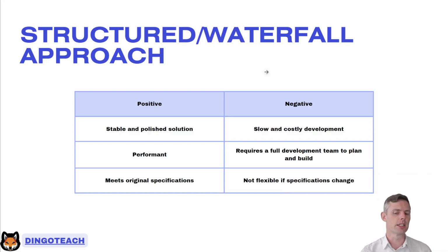It's not very flexible in terms of what if something changes mid-development? Okay, what if we planned out this WH&S program for the mining company, but then all of a sudden the laws change? Okay, and there's new requirements. Well, we either have to figure out how those new requirements are going to fit in, or we have to start from scratch. Okay, we have to start from the beginning and go, oh crap, it's thrown a spanner in the works.